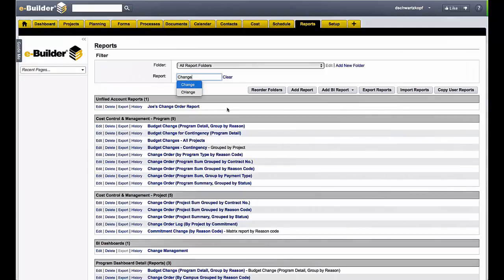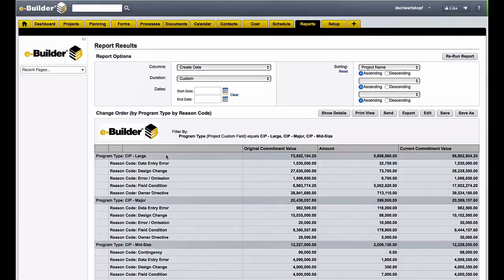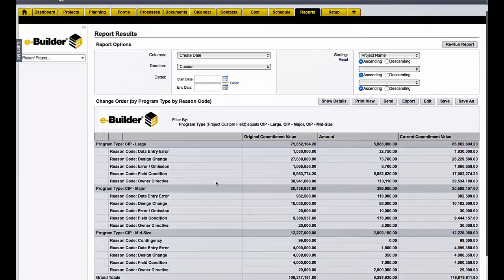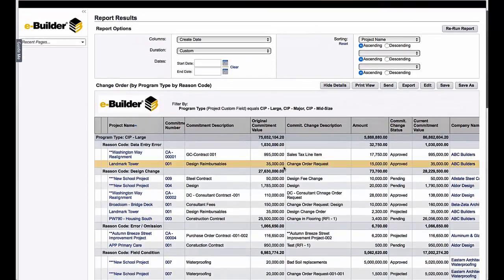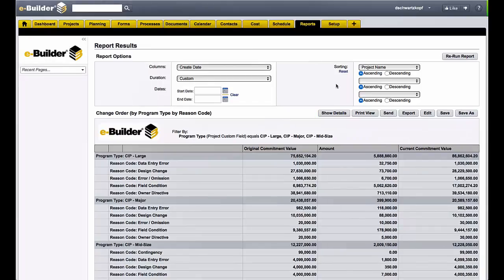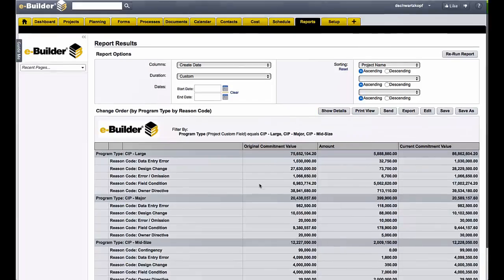Now let's take a look at some reports. We're going to do a search for a change order report and evaluate at the program level by the different types of changes and what their reason codes were. This gives us the full audit trail to see what change orders are happening that could potentially be causing cost overruns or eating into our contingency.